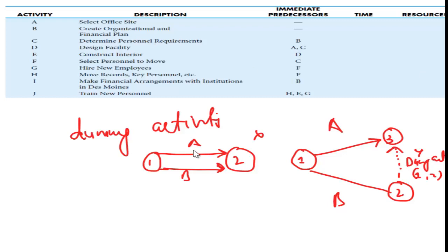Now, why do we do this? Because it's difficult to conduct computation, and the network loses its uniqueness in its identification. Such inconvenience causes frequent mistakes during network analysis. Therefore, we have to apply the dummy activity to consider it as two different activities.